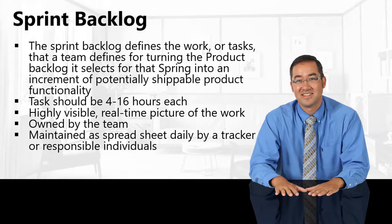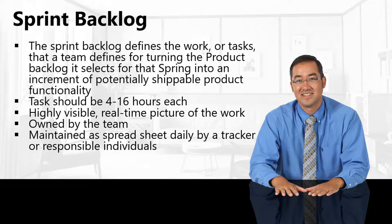The sprint backlog defines the actual work and activities that a team selects from the product backlog for that sprint, turning it into an increment of potentially shippable product functionality. The development team works on a task and turns that information into a fully functional product. Each task should be about 4 to 16 hours. The sprint backlog provides a highly visible, real-time picture of the work, owned by the team.